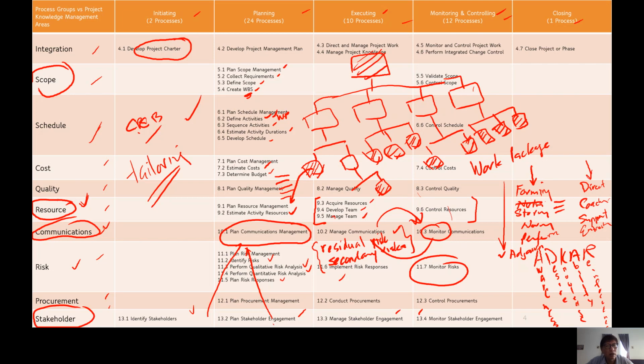Drop our guards down. We only monitor the high risk, the red light ones. Those are above certain criteria. The one in medium, it happens. The green one, it happens at low risk. So that's why we expect our risk reserve, our buffer, our cost buffer to attend to it. So these are things that we have to give and take.